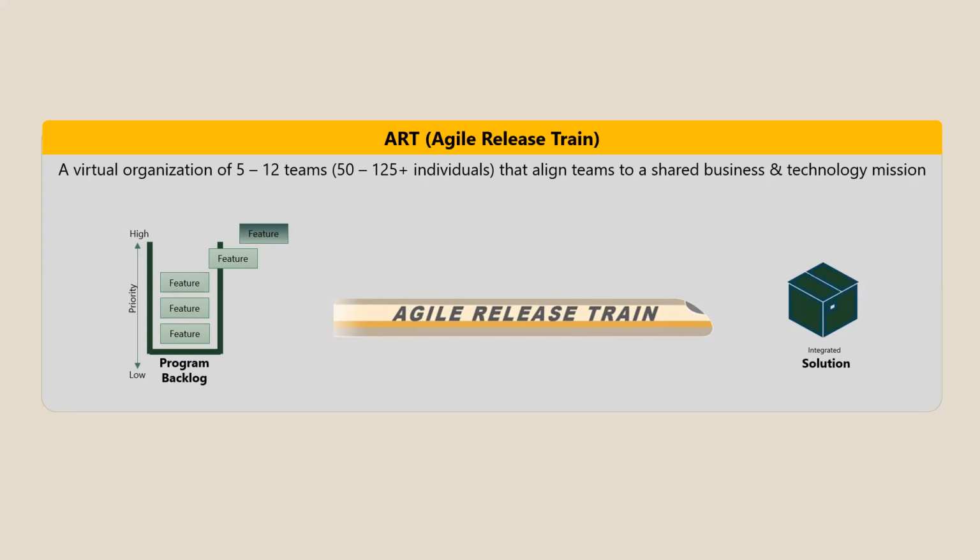One team is dependent on the other team. If one team delivers the cards on time, the invitation cards get printed on time, the other team, as per the RSVP, depending on the number of people coming, can book rooms. So one team's input is directly related to the second team performing their work. There are risks. If the trains are late, if there are no room bookings, these sorts of things are internally managed and focused towards a common goal, right? These are all multiple teams coming together, acting as one unit.